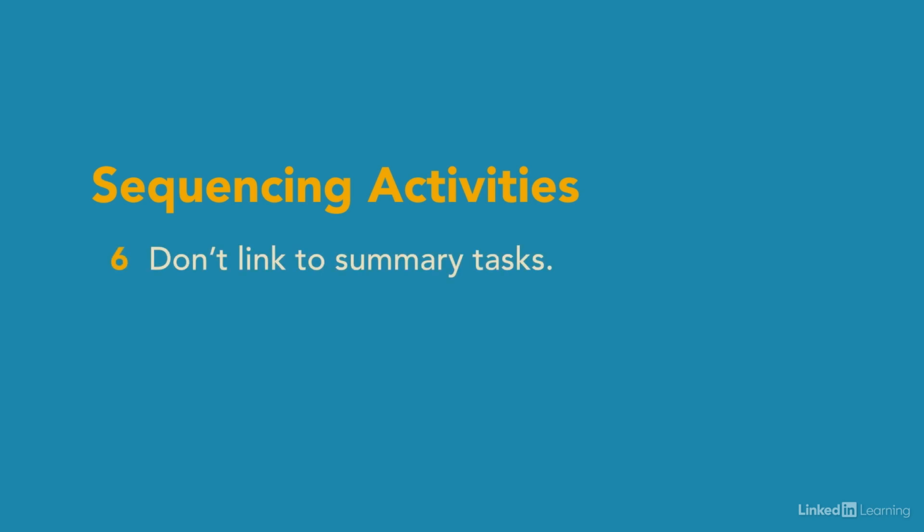Sixth, don't link summary tasks. A summary task is a summary of the activities that belong to it, so summary links aren't needed if you've linked activities correctly. In addition, summary task links make schedule logic hard to follow.